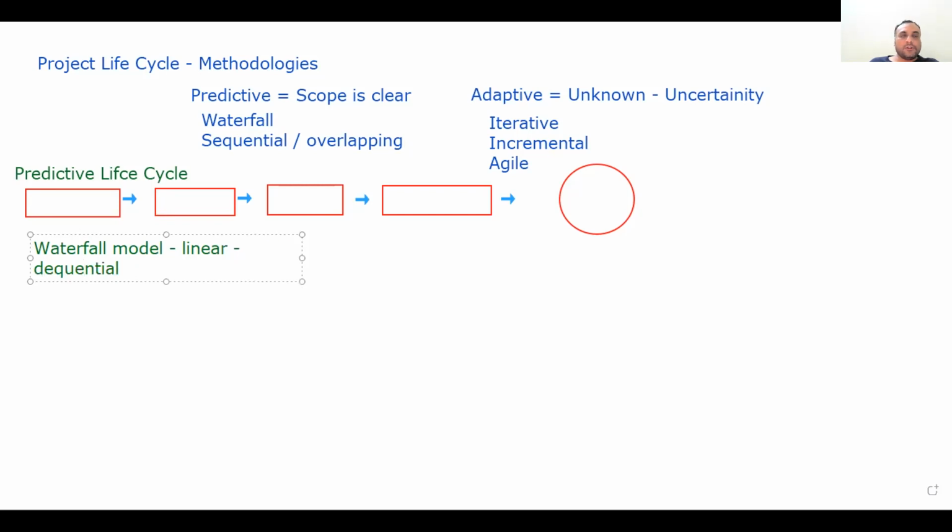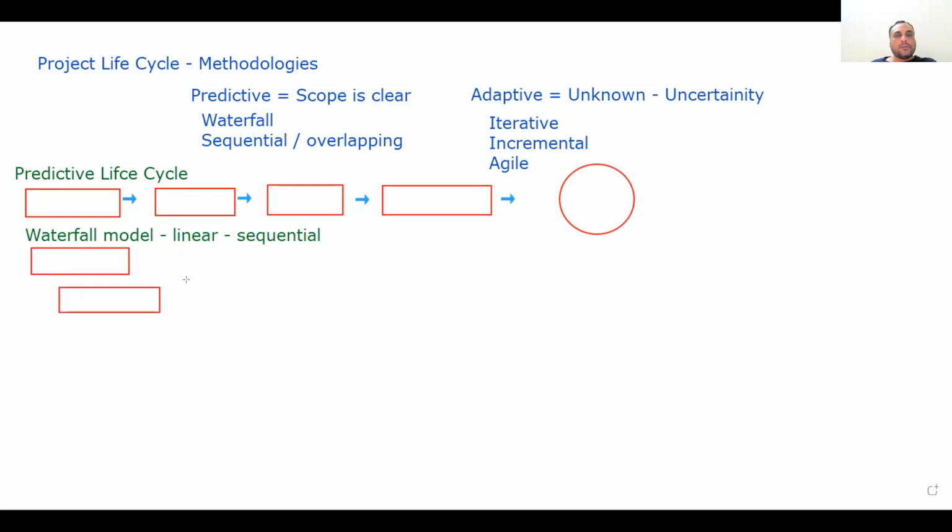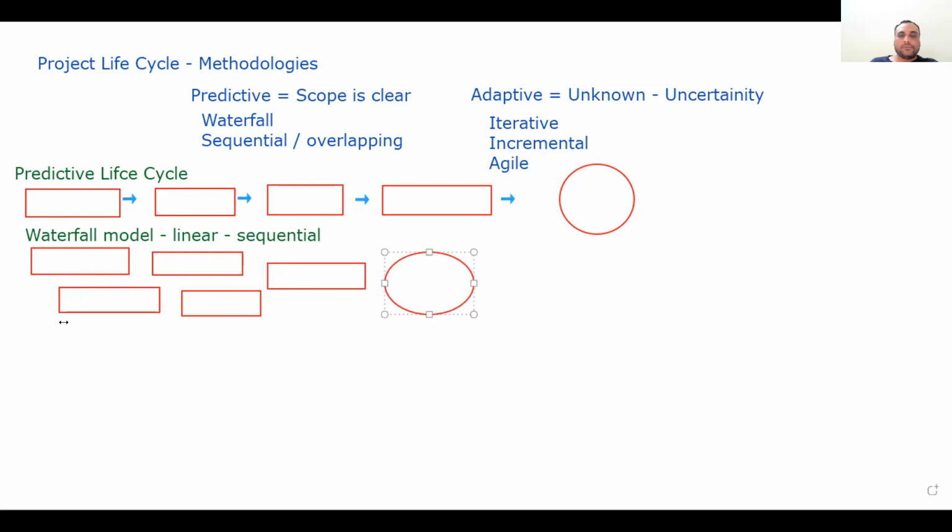So these are the terminologies for this life cycle, that you are doing phase 1, phase 2, phase 3, phase 4. And if you have done the project several times before, sometimes to save time, we can do the phases in overlapping. When you are doing the phases in overlapping, there's a good chance that the project can be completed earlier. Correct? Yes, sir. That is called overlapping relationship.